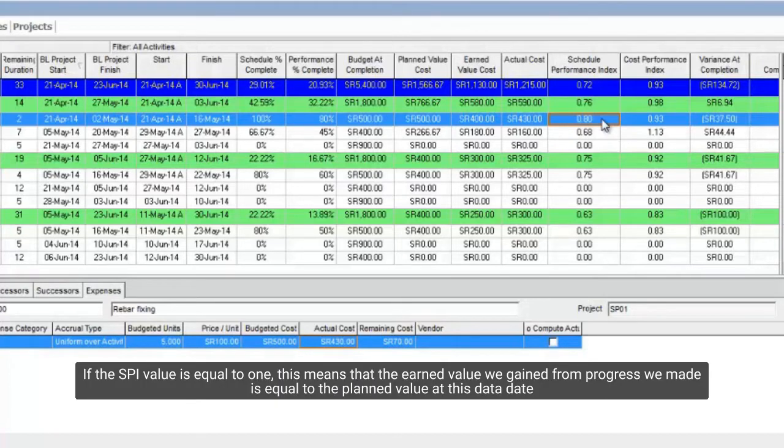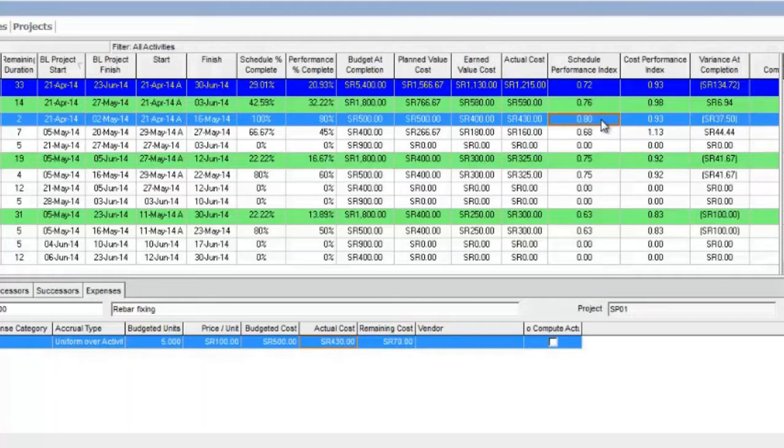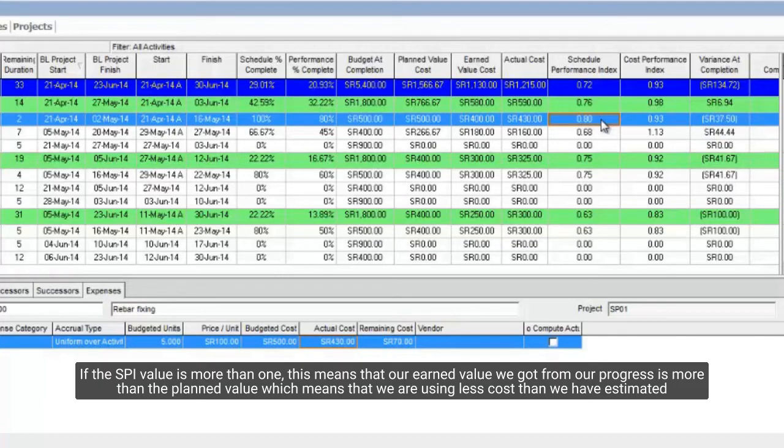If the SPI value is equal to 1, this means that the earned value we gain from progress we made is equal to the planned value at this data date. If the SPI value is more than 1, this means that our earned value we got from our progress is more than the planned value which means that we are using less cost than we have estimated.